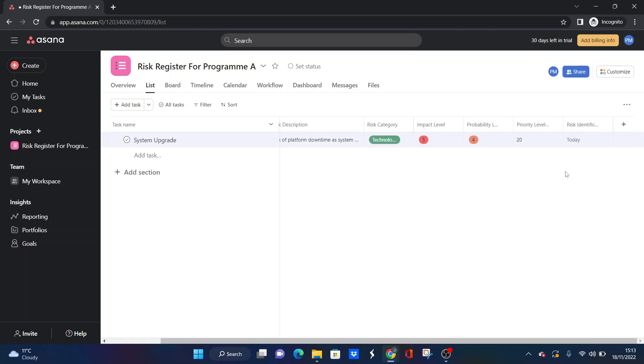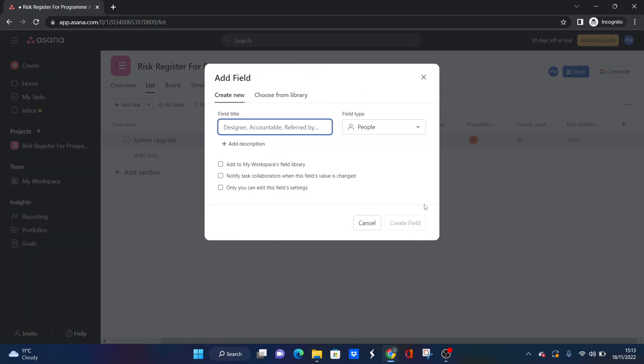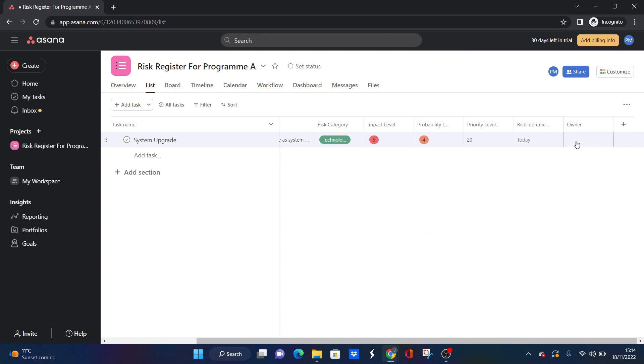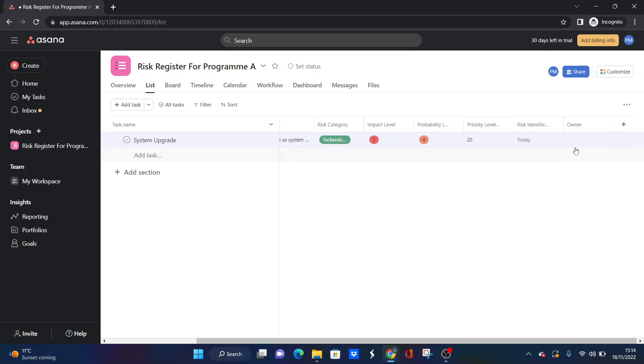Now we just need to add a couple more columns. The next one is going to be people. So we want an owner. We want to assign an owner to the risk. Someone who's going to pick it up, work on it, monitor it, maybe do those remediation plans, put in the controls, have the conversations with the stakeholders. So we need an owner. And I'm literally just going to put people and owner. And then from here, you can type in anyone who works within your team or you can invite people onto this project, or invite people to work on this risk register. And they can come in and start adding detail or maybe they can pick it up or whatever. It's whoever owns the risk.